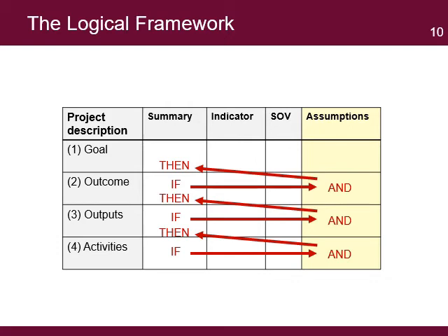The assumptions column is of great importance in clarifying the extent to which the project objectives depend on external factors, and it greatly clarifies the potential risks if they are not met. Tracking progress against a carefully defined output indicator provides a clear basis for monitoring progress. Verifying the progress of outcomes and goals simplifies the evaluation of the project and helps monitor its performance and take corrective actions on time.